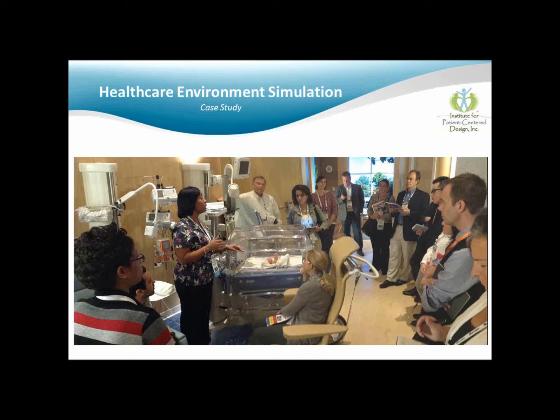Sometimes we receive a Revit file or SketchUp file or similar that is just really poorly authored, and it takes a little more time. But in short, we're typically spending between 1 and 4 days on the prep, the rendering, and then the kind of optimization and setup for the virtual reality experience. That translates to anywhere $5K and up a bit. So 5 to 10K, probably a decent estimate for creating the experience, interaction, optimization, everything. For example, any sort of patient room or operating room or clean core, even the lobby, things like that.